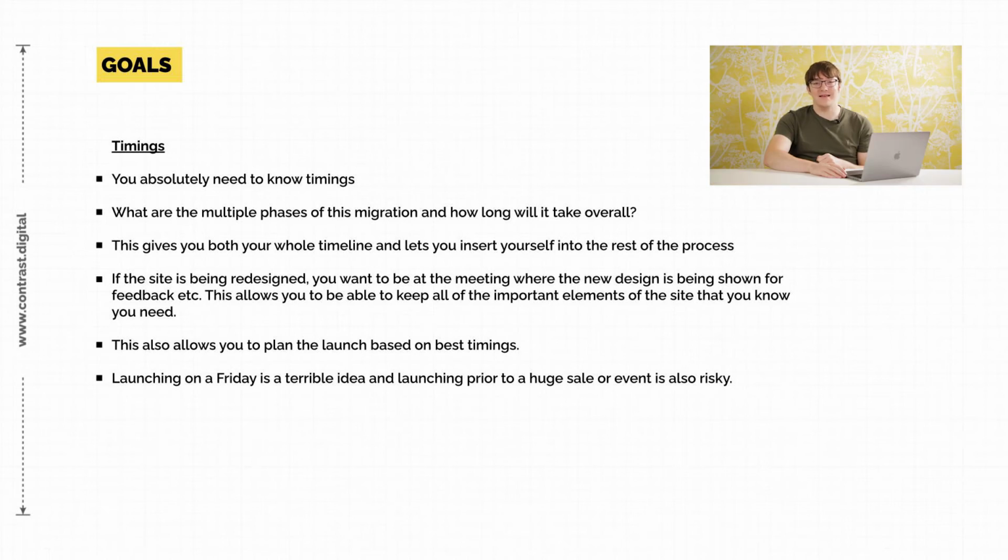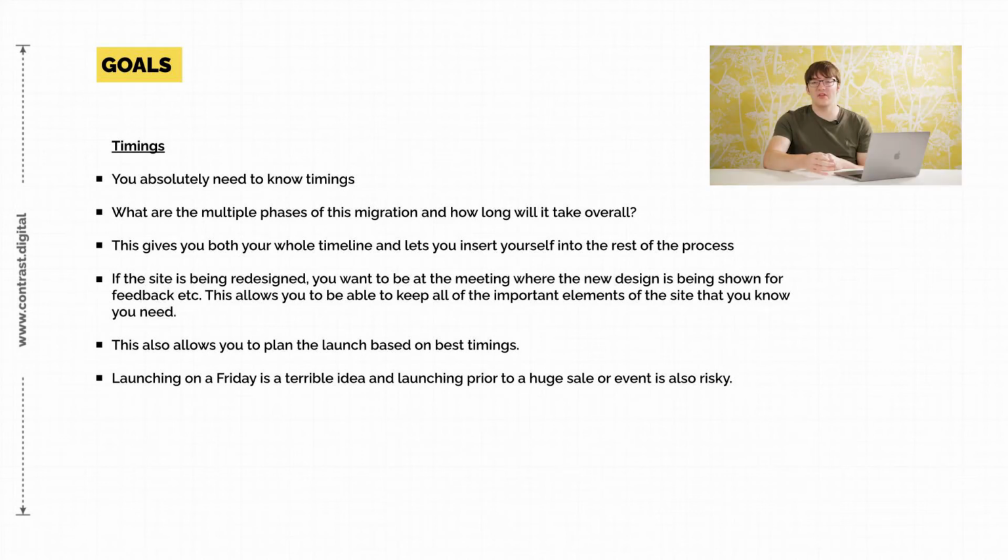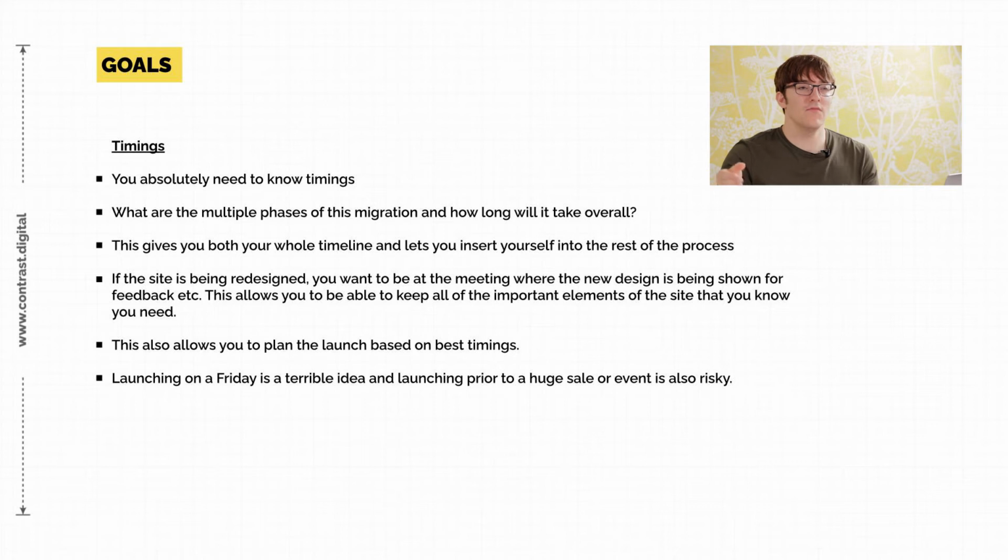It is such a basic thing, but the amount of times that I hear of people doing launches or migrations and putting them live on a Friday, why on earth would you want to do that? It's a recipe for further disaster. Launching, for argument's sake, at a less busy time, out of hours, you've still got team resources on hand to be able to do any changes. A Tuesday is a great day, because you've then got the rest of the week, should anything go wrong, to pick these issues up and fix them, rather than if it goes live on a Friday, no team's available and you can't pick it up till Monday and issues are already occurring.